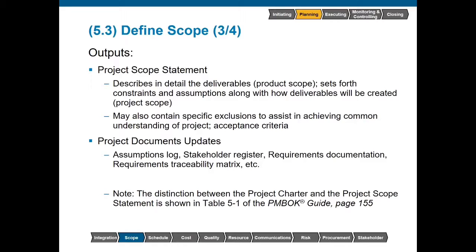And when we're actually building our deliverable, we want to make sure that the product scope is being measured up against the requirements that we were given earlier. Now, from here, we're going to also look at all of the work that goes into how we are going to make these deliverables, and that will be the project scope. So how are we going to bring on those engineers, those developers, the people involved in the design and the execution of all of this work? The project scope is everything end to end, while the product scope is specifically deliverable oriented.